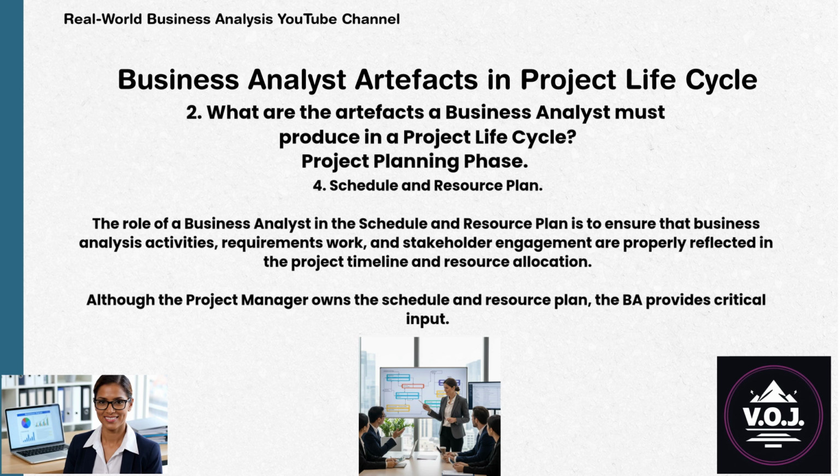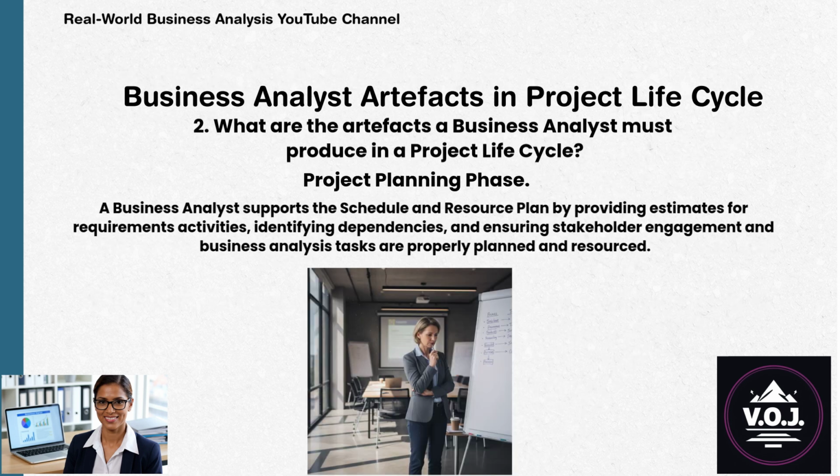Although the project manager owns the schedule and resource plan, the BA provides critical input. A business analyst supports the schedule and resource plan by providing estimates for requirements activities, identifying dependencies, and ensuring stakeholder engagement and business analysis tasks are properly planned and resourced.